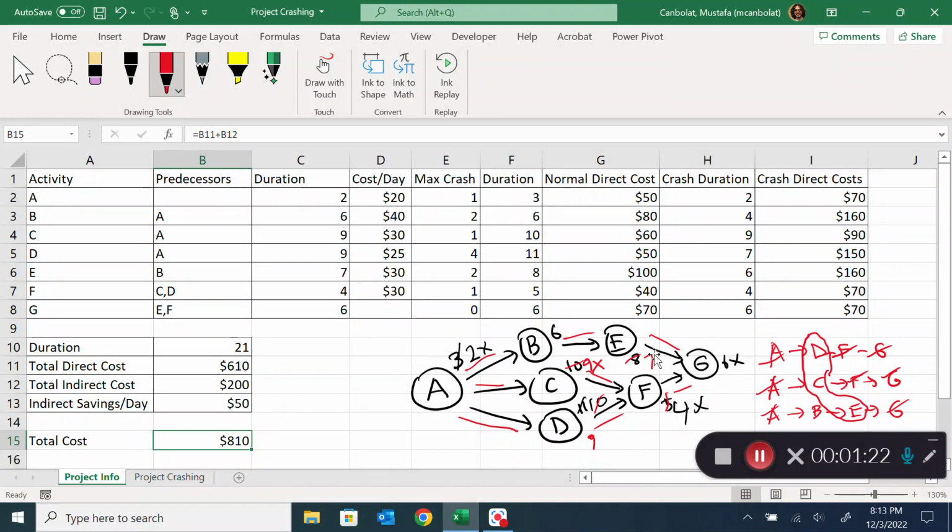The reason is that for certain projects, the ending node may not be a single node. It may be needed to finish with a merge activity and just consider another node with zero duration, and that would be our end node.